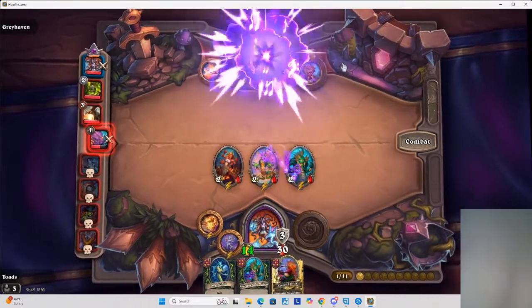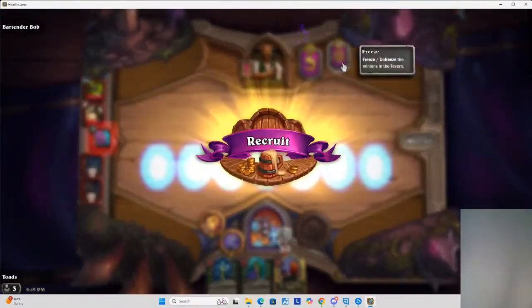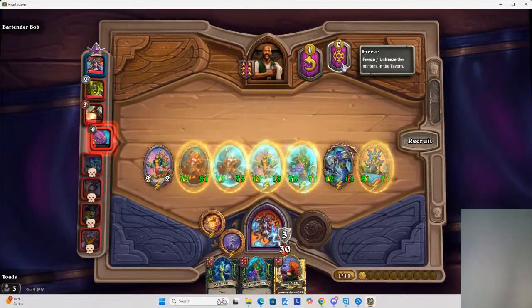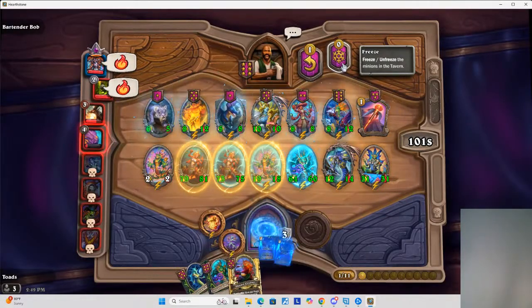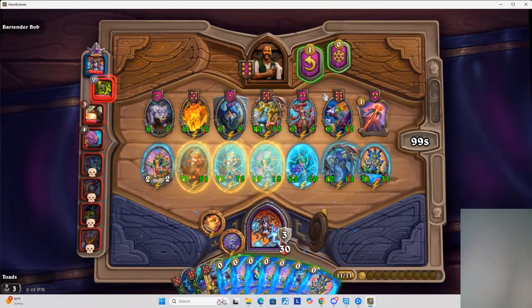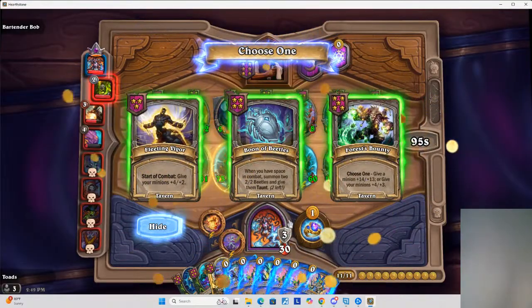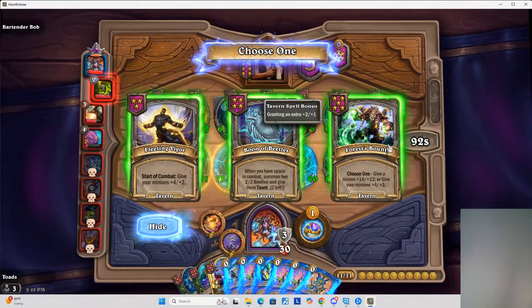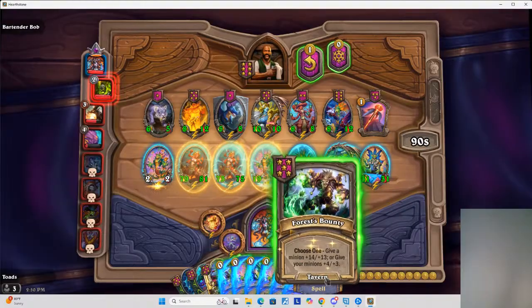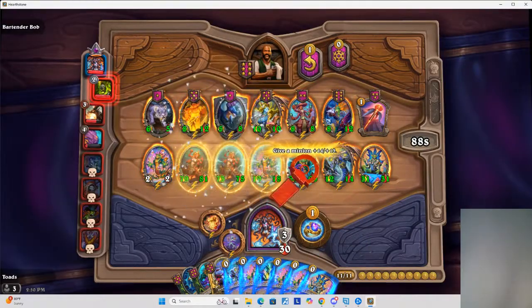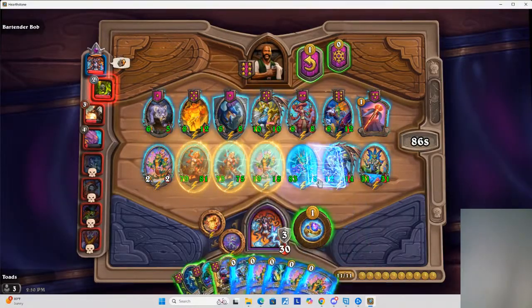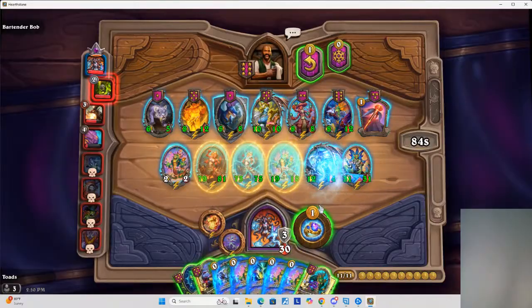When the project team is fairly small, consider getting the whole team together to brainstorm the required work. You're less likely to forget tasks, and it'll help build buy-in with the team. If a project-wide meeting isn't feasible, smaller teams can identify the work for their part of the project. Then you and team leads can assemble the complete task list.